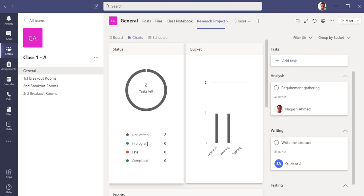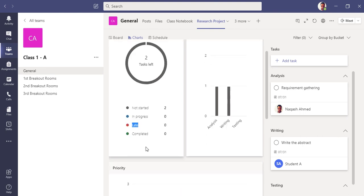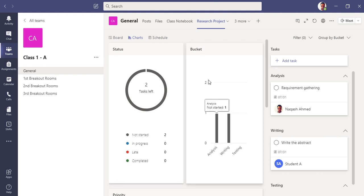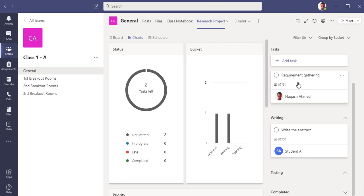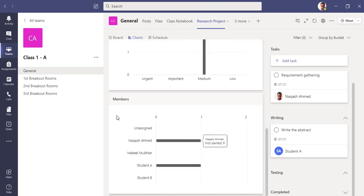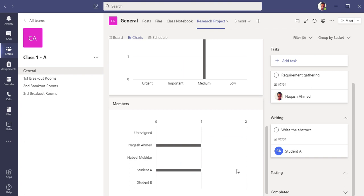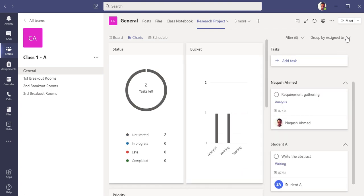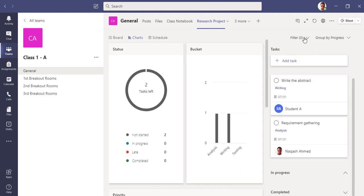These are the statuses: In Progress, which means the task is now under process; Late, which are tasks not completed by the due date; and Completed. You can see bucket-wise we have three buckets. You can also see priority-wise and member-wise who has been assigned. You can group the buckets by assigned to or filter them here.